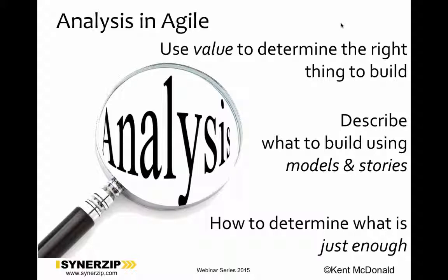So you go back and think, okay, what's the next thing on the impact map that we think is the next best thing to do? So this is a way of structuring that discussion. We could populate the backlog with all of these items, but instead we're going to just take one of these and blow that out and identify what are all the things we need to do to make this one thing happen, do that, deliver it, see the results, and then decide what we do next.